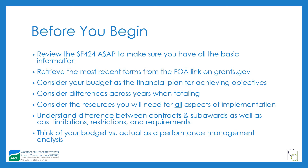Understand the difference between contracts and sub awards, as well as cost limitations, restrictions, and requirements. There are federal definitions for this distinction, and both are included under 'contractual.' Make sure you know the difference and show them separately in your budget narrative. For areas where there's discretion, the most important thing is to have a policy, follow your own policy, and be consistent across federal grants — that's what monitors will look for.